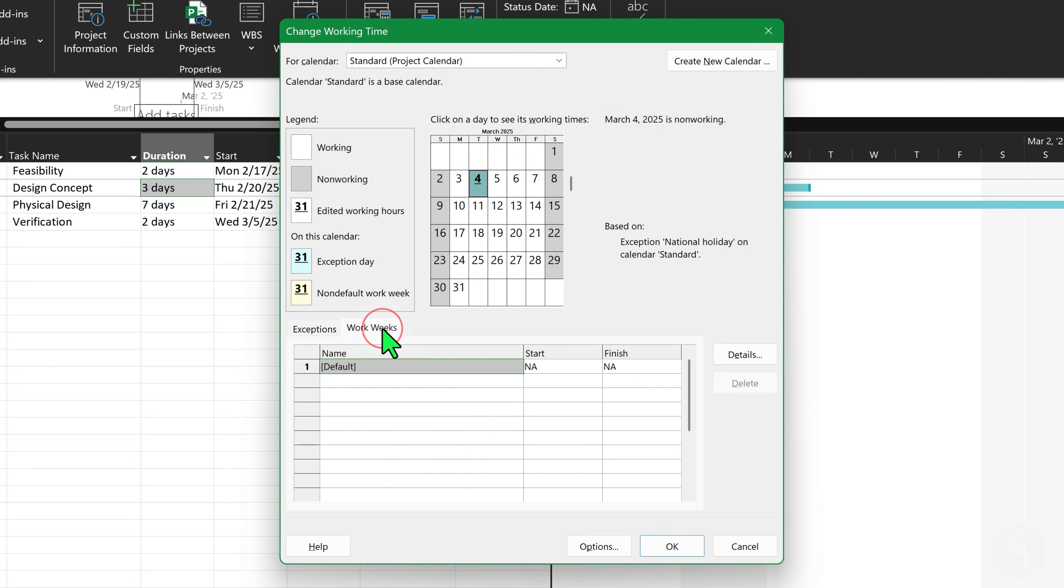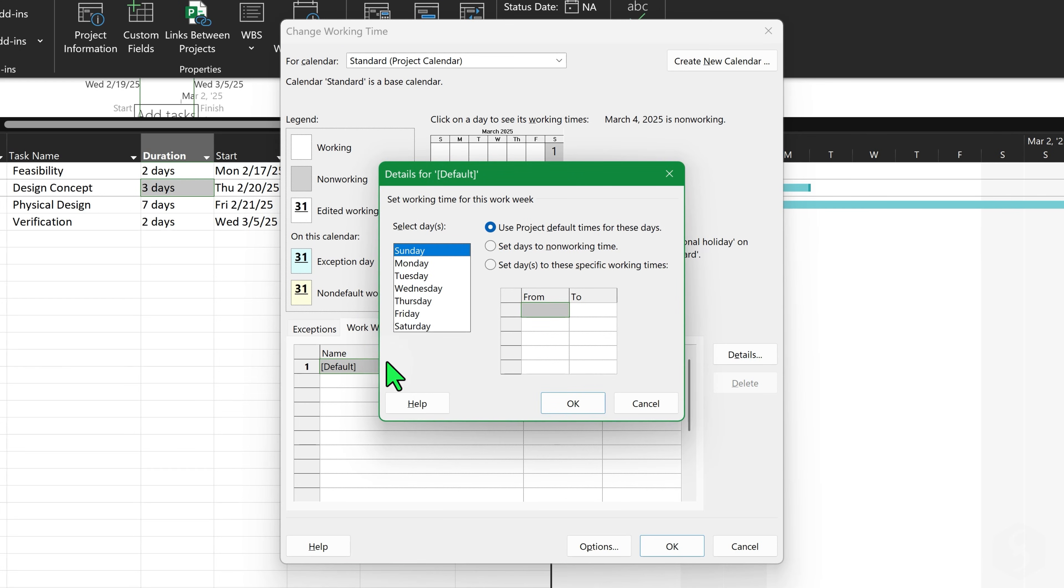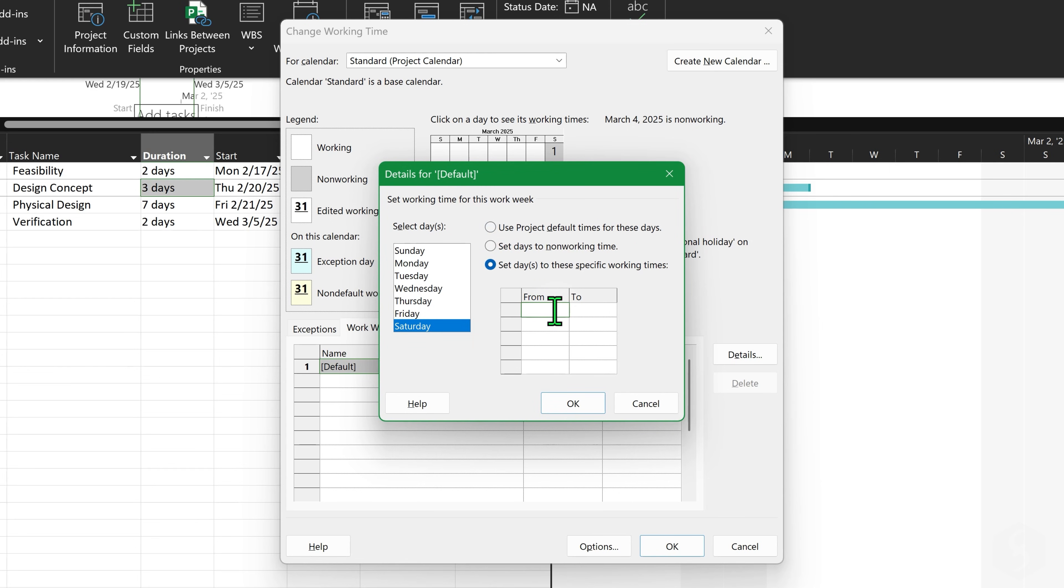Under Work Weeks, define the general rules for the working days of the current project. Double-click on Default to set which days of the week are non-working, which are working and add special working hours if applicable.